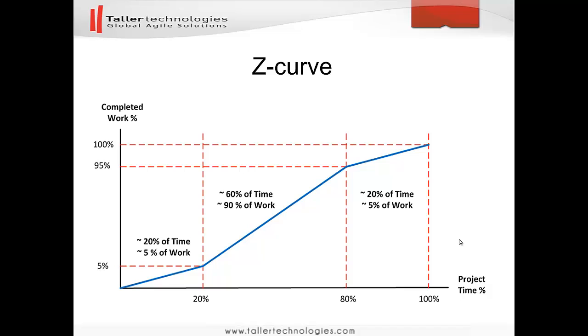Of course, numbers may vary depending on the context, but the basic principle about the three sections is correct. Only the second leg of the Z-curve is representative for the development system capability. It shows the common cause variation specific to each dev system process.